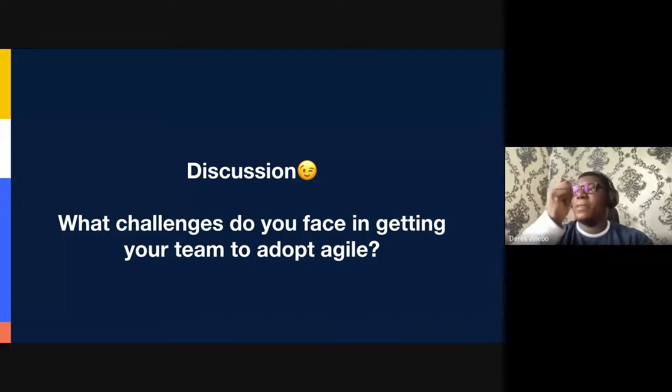So you find out that if you bring in 4 story points, your team committed to only 30 story points. So if you don't remove 4 story points from your current work, your team is going to be working on 34 story points, right? And they did not commit to 34 story points, they committed to 30 story points. So they will not be able to deliver that 34 on time, except they are really good. But most likely they would fall short.